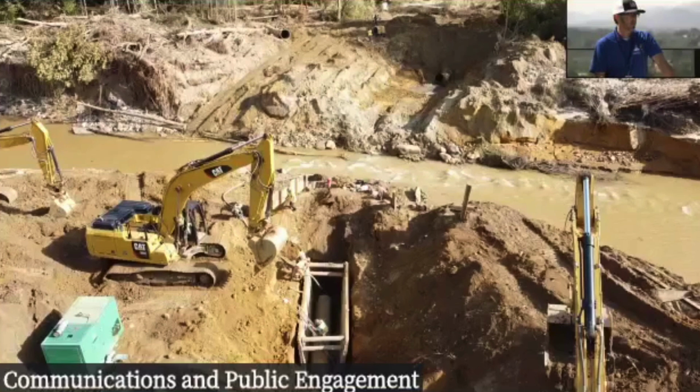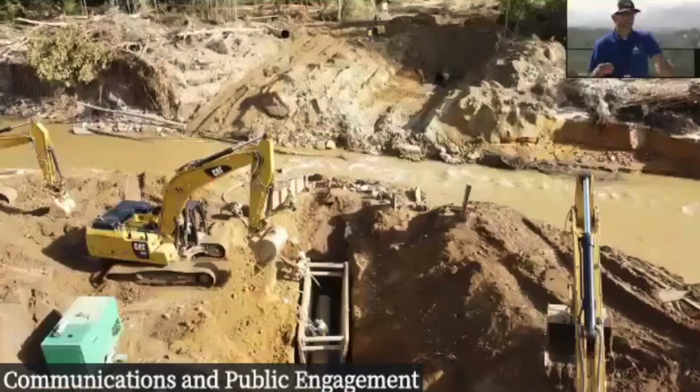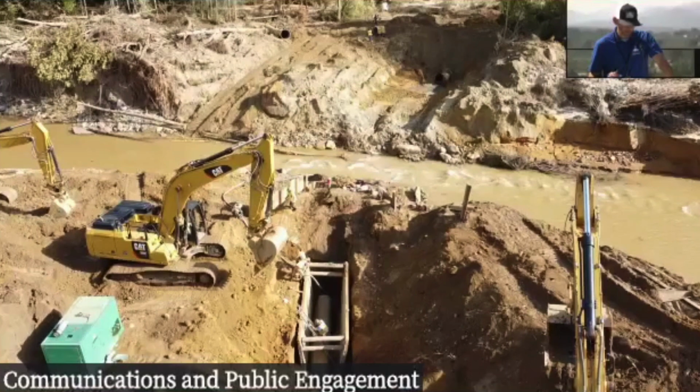So as these pipes wash away, the pipes that remain are going to get sediment, boulders, rock, debris in them. So when we make these connections, we have to make sure that we're connecting to an open pipe. The way we dealt with the boulders is we removed that section of the pipe. It was damaged, and that's another segment we have to install. So that's really the process that you're going to see to get this bypass line connected.